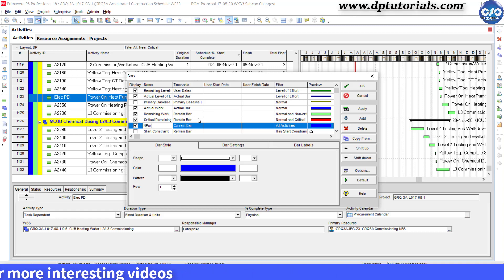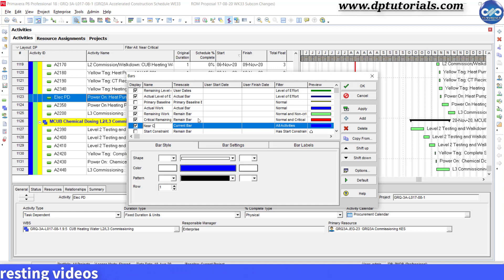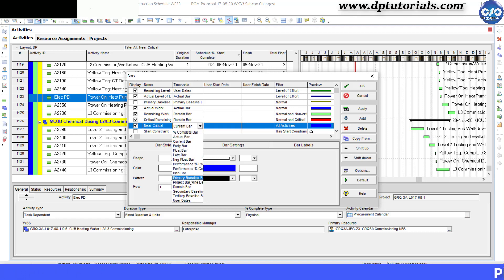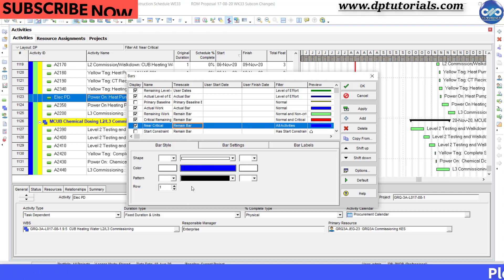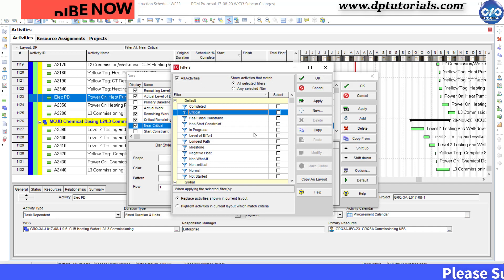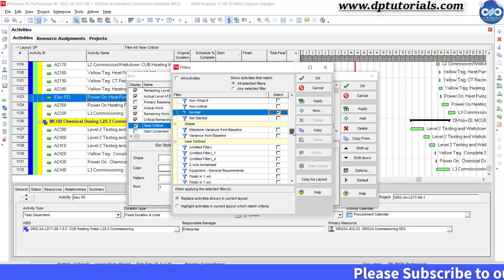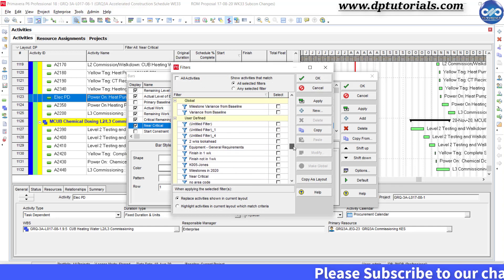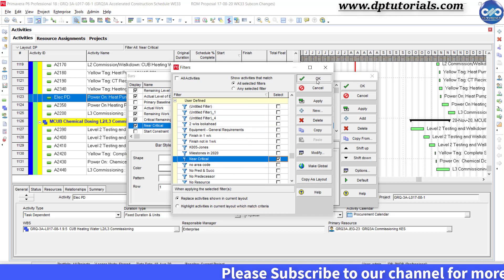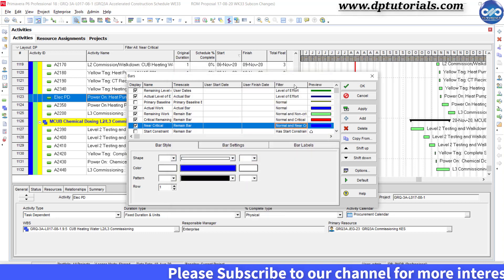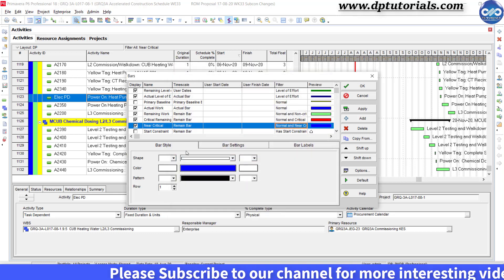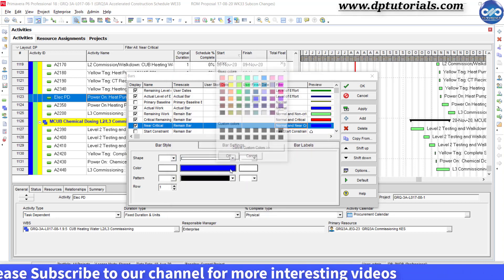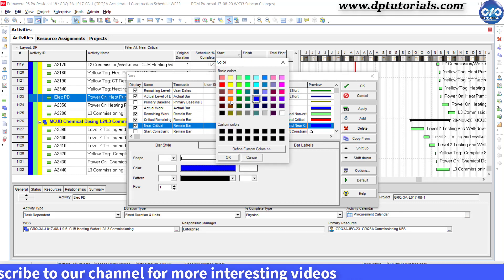Now give a name to this bar as near critical. In the time scale column, mention the value as remain bar. And in the filter column, select both the normal and near critical filter. In the bottom portion, set the bar color and patterns as per your wish.